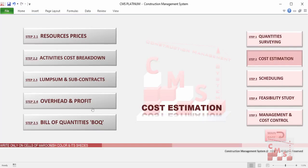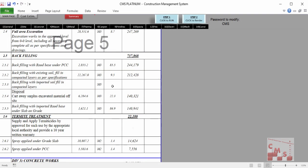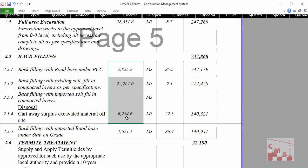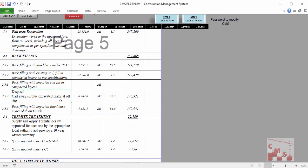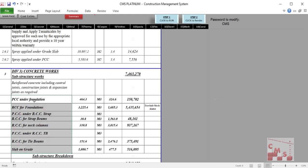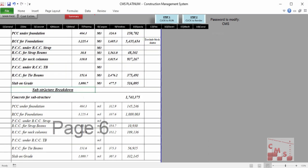Overhead and profit will be distributed across all project activities and will appear automatically in the produced bill of quantity. Accordingly, CMS will produce a full bill of quantity automatically, including all required activity quantities, the rate for each activity, and the price for each. For example, for earthwork: the excavation quantity, the rate of excavation, and total price; backfilling of all types; and disposal quantities are calculated automatically, with rates determined by CMS.